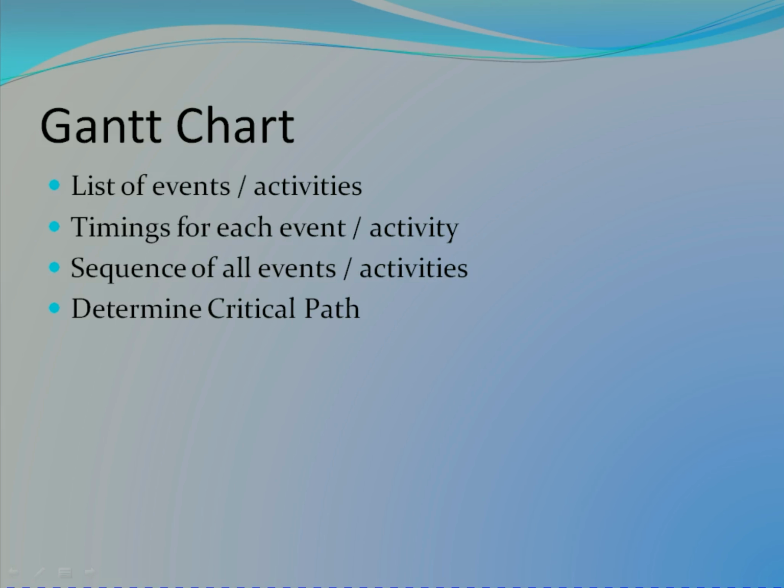There is also the opportunity to look closer at the Gantt chart timeline and identify areas where we might be able to help a project from falling behind time. This is done by identifying those activities which are short and run in parallel to the critical path. If one of the critical path activities starts to experience a delay, we could consider taking some resources from a non-critical activity and reallocating them to the critical path to get it back on track. This is called crashing a project.